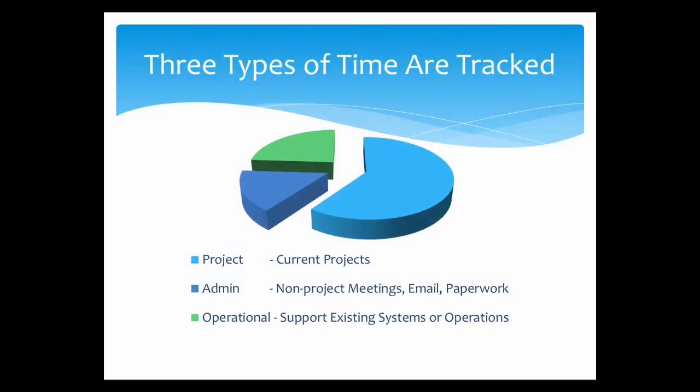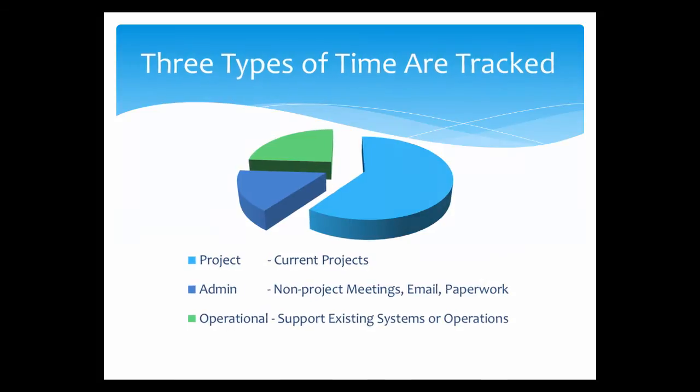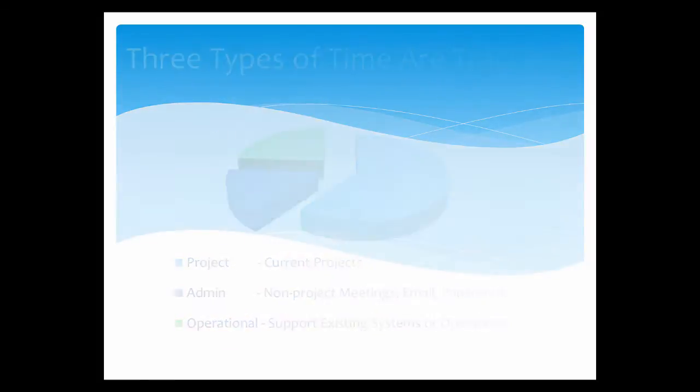Three types of time are tracked in ATTASC: project time for current project tasks and issues, admin time for non-project meetings, email, and paperwork, or operational time for time spent supporting existing systems or operations.